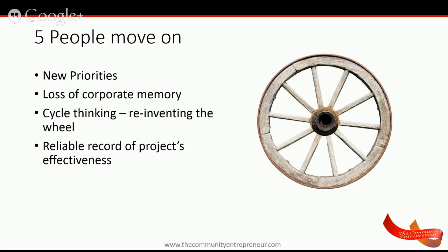and then you end up with this cycle, where people go back and think, oh, wouldn't it be a good idea if we did this? And this could be something that you did 5 years ago, 10 years ago. In fact, in one job I was in, we were looking at a project on literacy, and I would actually go back to reports going back 20 years, because the cycle seemed to be as much as 20 years. I could go back to something that had been evaluated 20 years ago, and look at the data that came out from that, not just the data, but the story that it was telling me. And I was able to use that information to put together the guidelines for new projects that we were going to put out 20 years later.